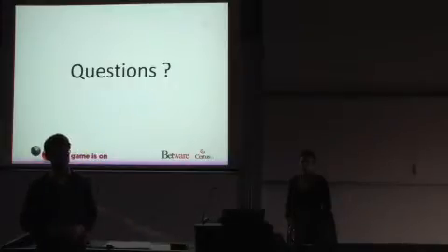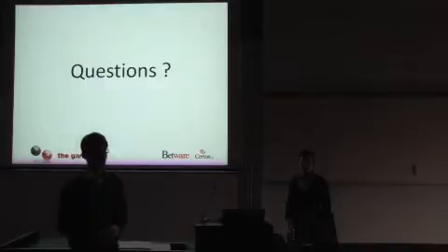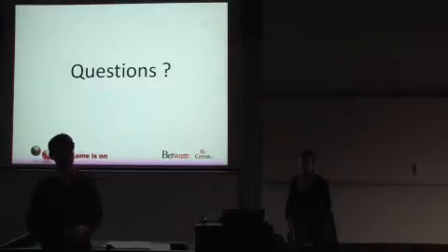Basically, we allow each team to decide for themselves. Each team has the authority to decide. But I think most teams are running 2 week iterations, and the team I'm working with has sometimes run 3 week iterations just because we could complete everything within 3 weeks, and we decide that in each case.